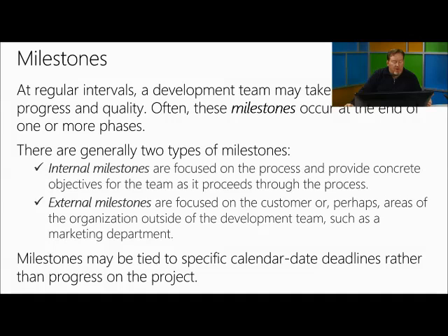Now, milestones may be tied to specific calendar dates rather than the progress of a project. Do you see milestones being tied to dates as primarily a waterfall approach? Right, that's a waterfall approach. Okay. So the milestones and the phase gates are all aligned with each other, and they're really important tenets of the waterfall methodology. Whereas progress on projects, is that more of agile? That's right. Okay, great.